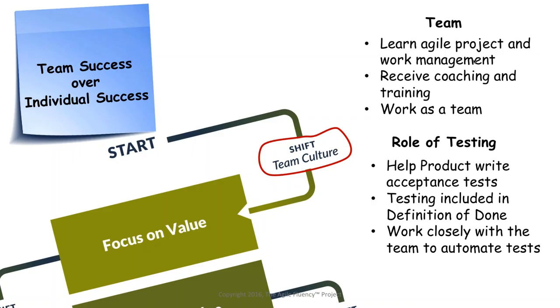Very much focused there. The role of testing here is to help the product folks write the acceptance tests so the teams can know what value looks like. When they are presented with a story, a chunk of work to be done, how will they know when that is going to be valuable? So testing needs to be included in the definition of done.